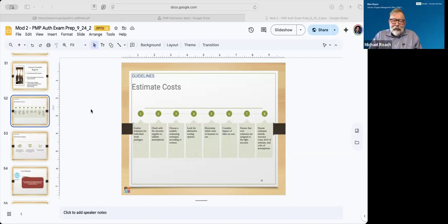So some of the very large construction projects that I've done in my past would be years of construction. We would place orders with large manufacturers or even countries to buy some of the raw materials. And then we'd buy futures against it, so you kind of buy it on two fronts.